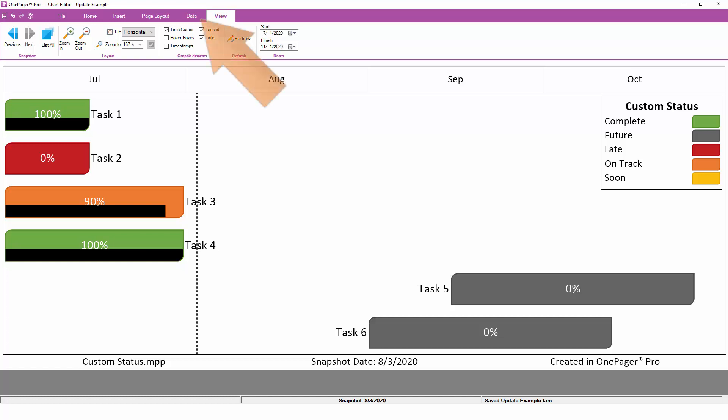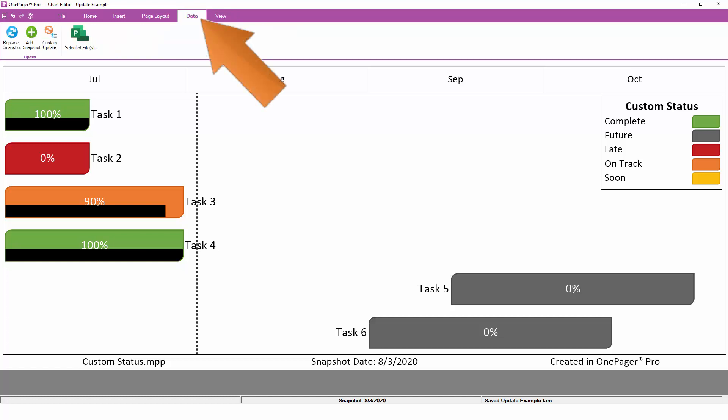Outside of a push update, you can also initiate a pull update from within the data tab of the ribbon. This will retrieve updated data from your project schedule without you ever having to leave OnePager. Think of this as a real-time refresh.